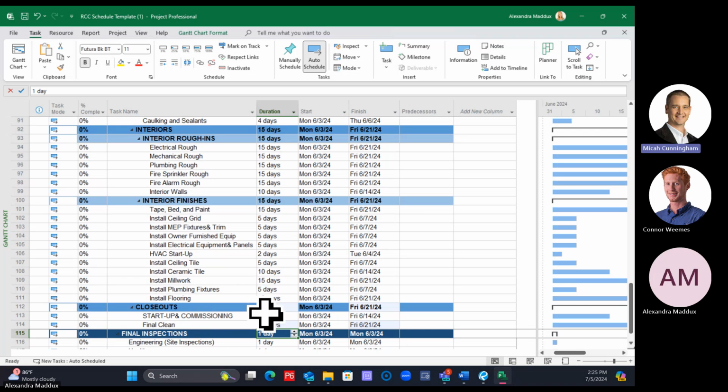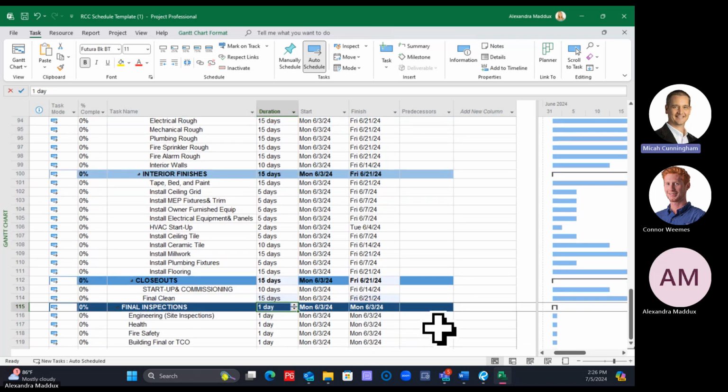So if you wanted to add a contractor punch list and a rough clean and just other activities to that section, just buffer up that time frame, you could do that just to show a later finish date, or to use more of your time. So if you wanted, the closeout section is just an opportunity to add more float that's not called float. So if you're gonna finish early, start up.